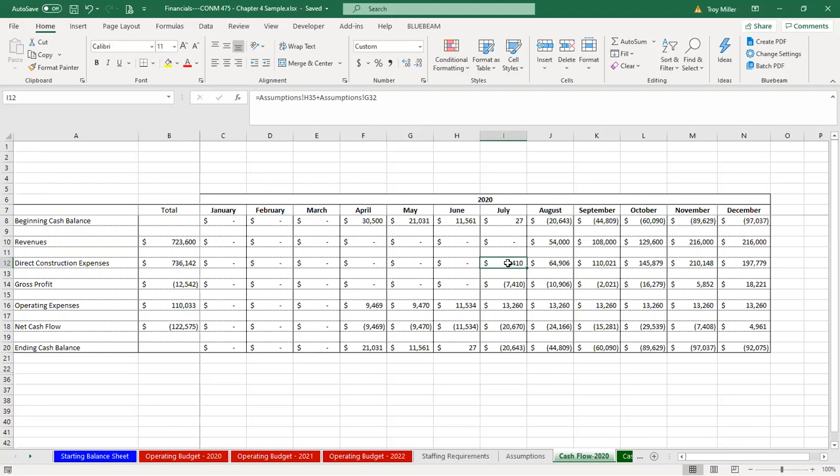Now, for those of you that are in the project management class now, because we're talking about this in that class, and the others of you that have had project management, remember that the terms of payment on those subcontracts are that anytime during the month a subcontractor comes in and works on the project, he's not allowed to bill for that project until the end of the month.